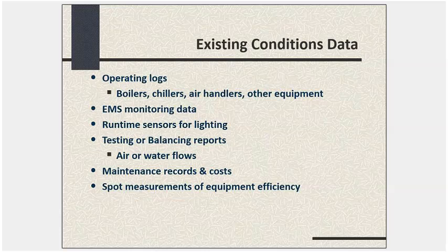Air flows, water flows? Do you have good maintenance records that are complete and go back a little ways during the baseline period? Let's suppose you define a baseline period as a specific year. Well, do your maintenance records and costs cover that whole year? Do they cover it comprehensively, or is there data missing that the accounting department doesn't have? That's important to know.